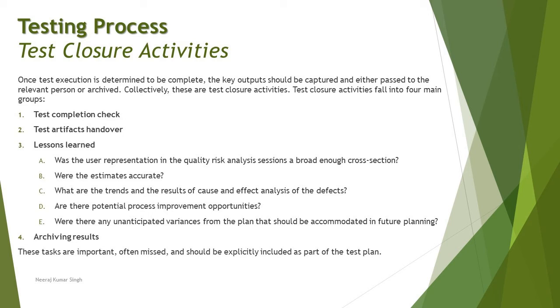The second question you can ask is, were the estimates accurate? Of course, we call it test estimation, where we estimate the effort, cost and budget required to do an activity. But at the end of the day, it is still an estimate. So you measure how much you have spent, how much time and effort you really required at the actual when working on these activities.